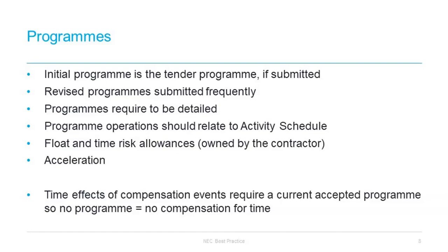So, as I'm saying, it is important to recognise that acceleration is something entirely different to other time-related events, and not something that contractors can be forced into. However, of course, as a contractor, you must be aware that if you are in delay, and if you are going to complete later than the completion date, you might be liable for liquidated damages if you don't meet the date that you ought to.